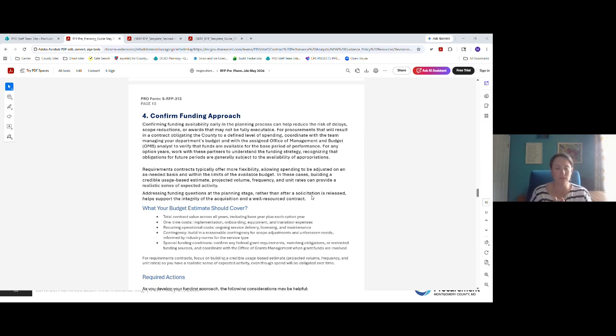There's all sorts of different reasonings or some exceptions that could be made depending upon requirements, type of contract, or specific situations or circumstances. But for the most part, everybody should default to, I shouldn't do a solicitation unless I have funding. All right, that is a general default. There are circumstances that are different than that. Again, requirements, type of contract. It's like, yeah, you may have a budget that's sitting there, but you don't necessarily have funding directly tied to this contract.